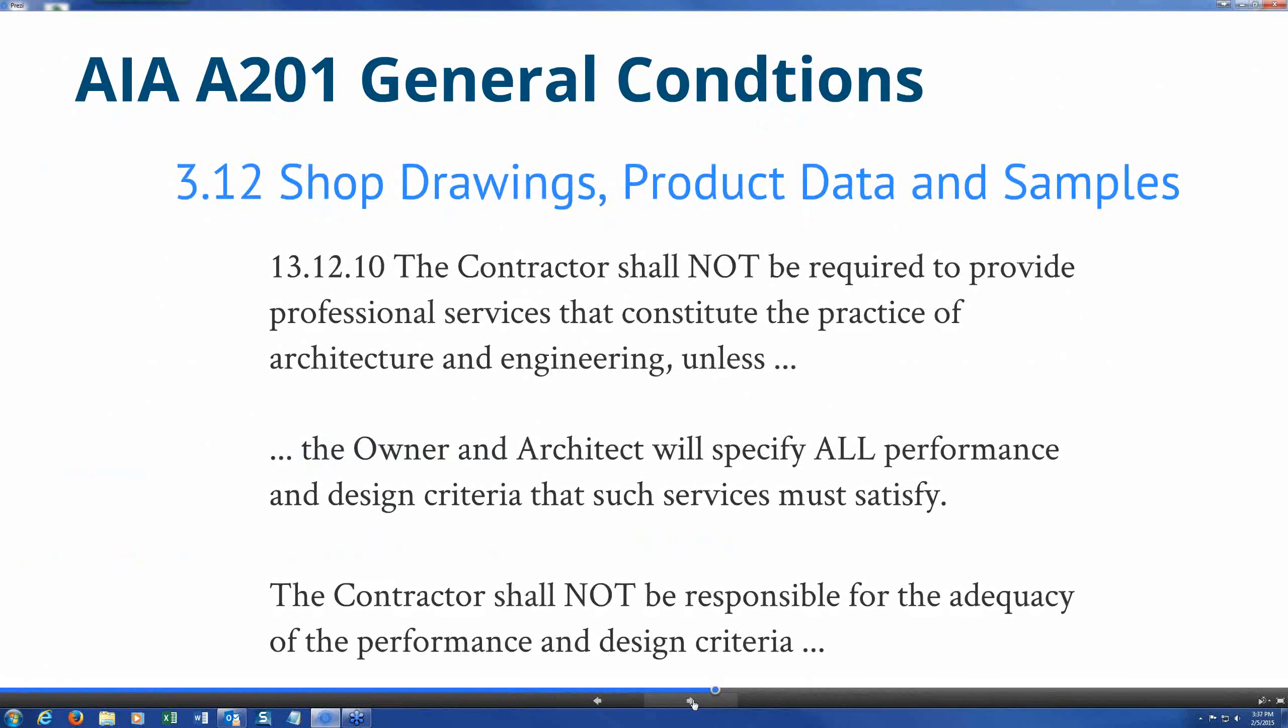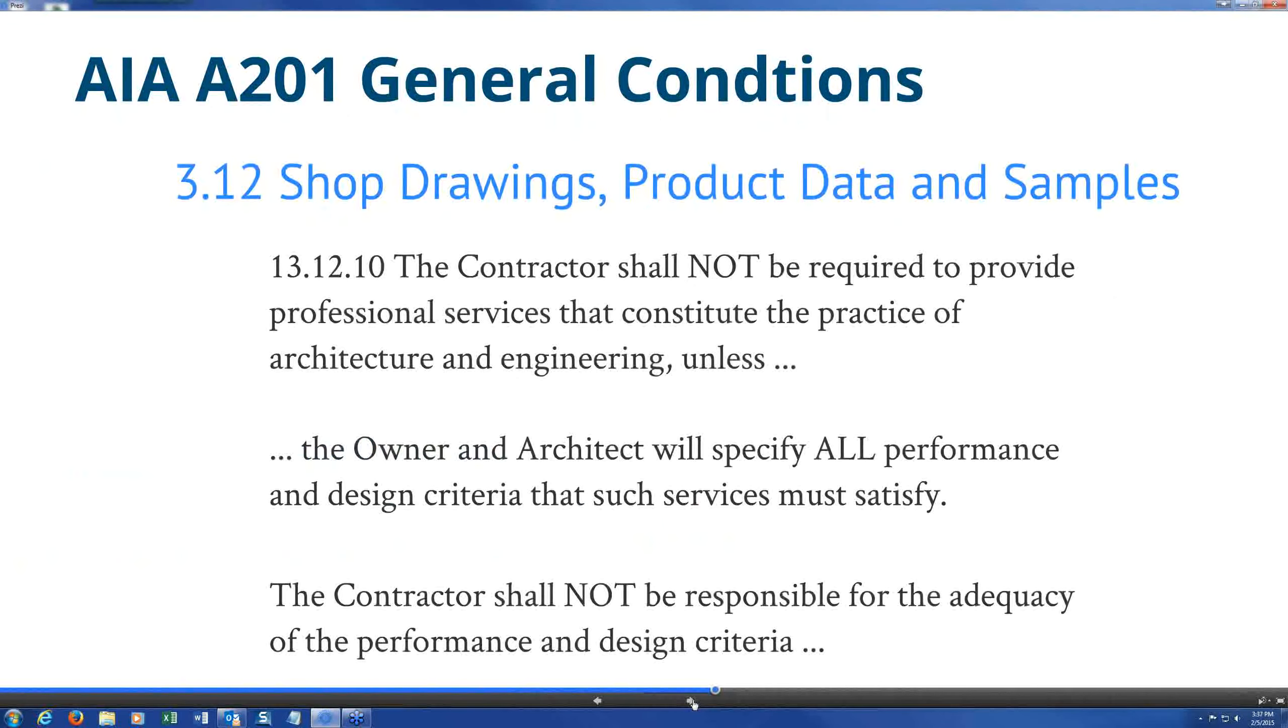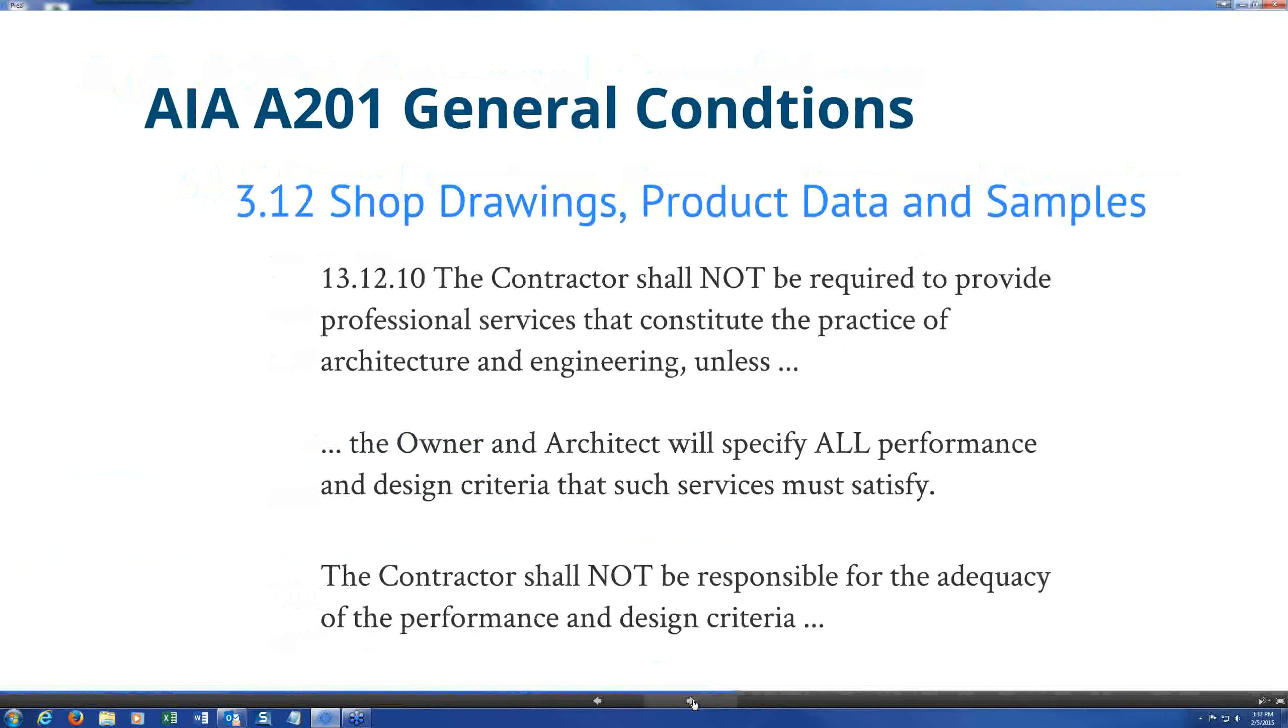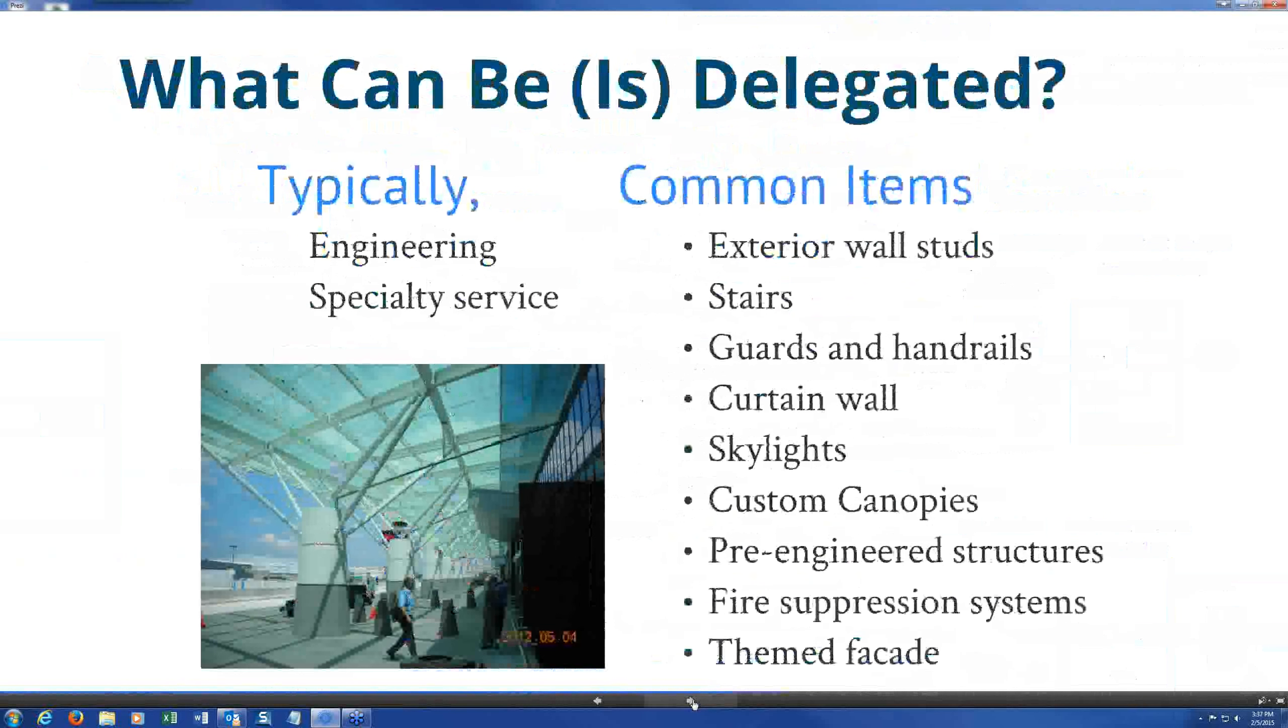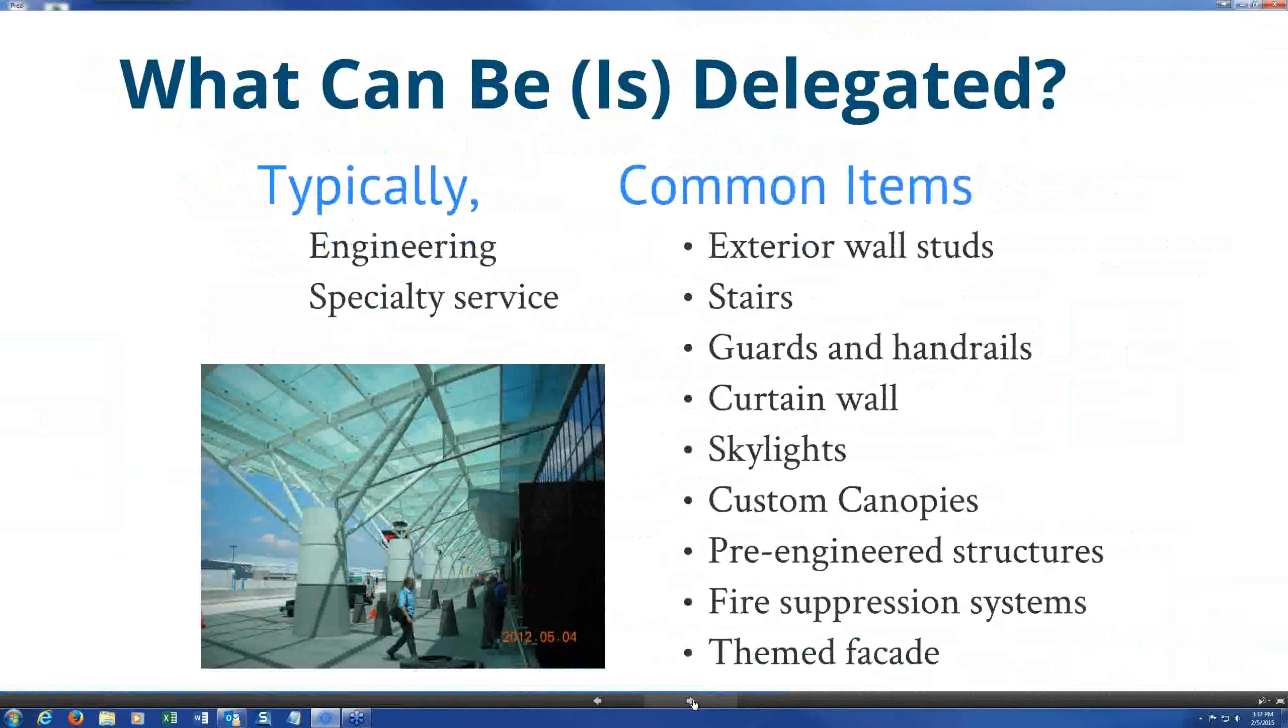I think the end of the discussion in A201 is actually one of the most important. It says the contractor is not responsible for the adequacy of the performance and design criteria. So if we specify performance and design criteria and the contractor follows exactly what is specified in producing his final design, he can't be held liable for anything that may be missing. Right, and that's based on the Spearin Doctrine from that court case. I'm not going to quote the year, but yes it is the Spearin Doctrine where by producing the contract documents and the owner providing those documents to the contractor, there is an implied warranty that should the contractor actually produce the construction meeting the requirements of the contract documents, he's fulfilled the contract. Yes, and Tommy says it's 1918. That one's near and dear to his heart. It should be near and dear to every specifier's heart.